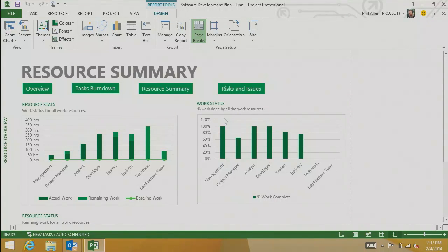For myself, I put that in the local global, and so the way it works for me is I can now use that in all of my projects. If my company has a way of rolling out a global.mpt to everyone in the organization, we could add it to that one, and they could pick it up just like that. Or, of course, you could just save a blank report template into an MPP plan. It's saved as part of the MPP plan. Email the MPP plan around and tell people to put that into their global, or by default, those reports will go into your global anyway upon opening that MPT. So you could just email it and it spreads in a nice way like that.